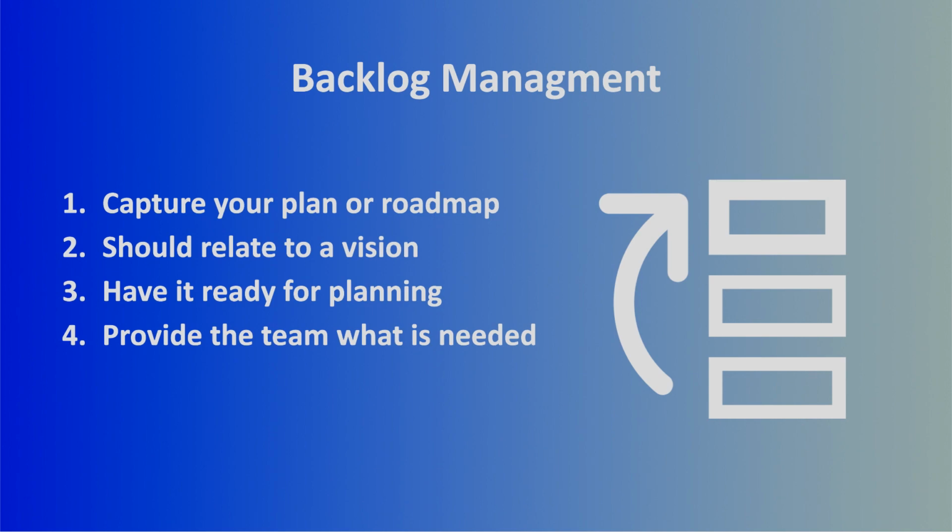Next up, you should have it ready for planning, right? Scrum works in sprints. Often I see it be a 2-week sprint, so you'll be working in 2-week chunks. So you want to have a backlog that's really going to support a 2-week sprint. You want to have enough work in there to keep the team busy for 2 weeks, a little extra at least, ready to go.